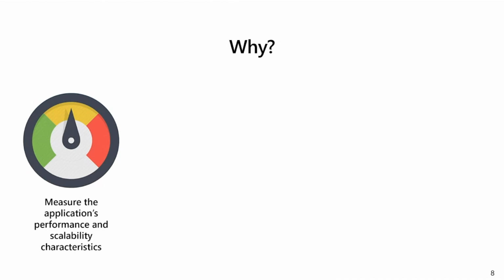That's why we really suggest partners, vendors or customers perform day in the life testing, especially in large-scale enterprise projects. If you have high volume transactions daily, or if it is a mission-critical system, it's more important to measure the application performance and scalability characteristics. For example, you may not find any performance issue in the performance validation stage because you are running single tests only in sequence. So there is no issue found in performance validation, but you may find some issues during day in the life testing.